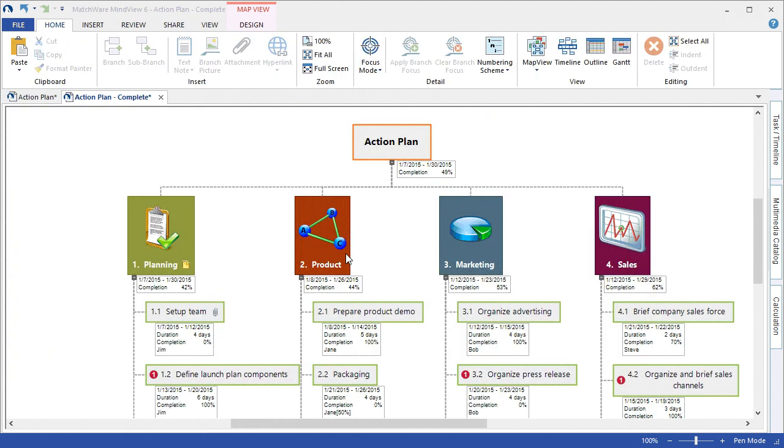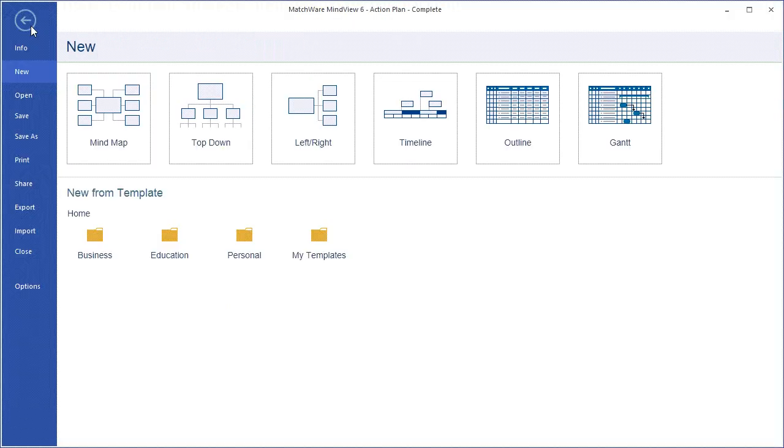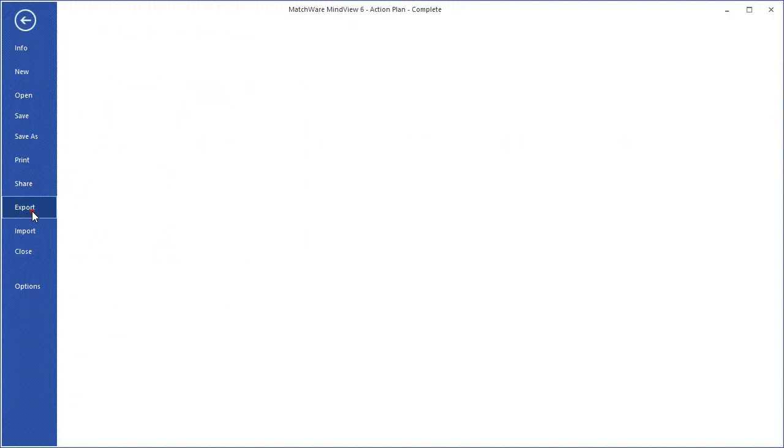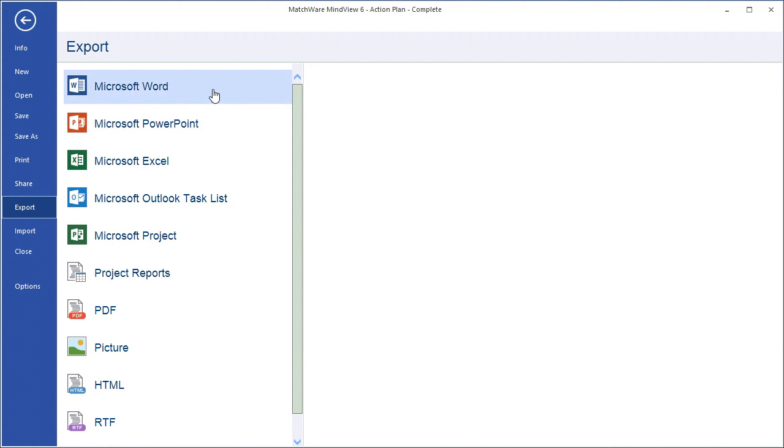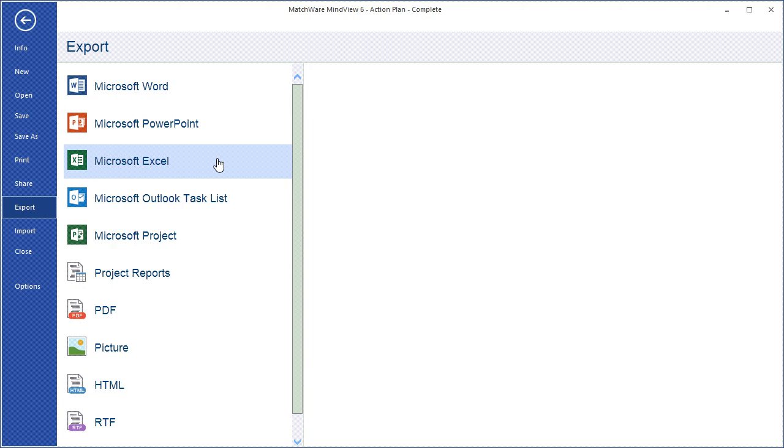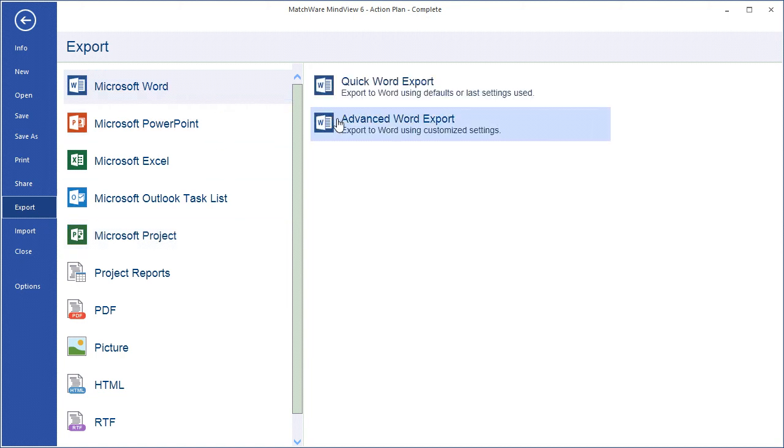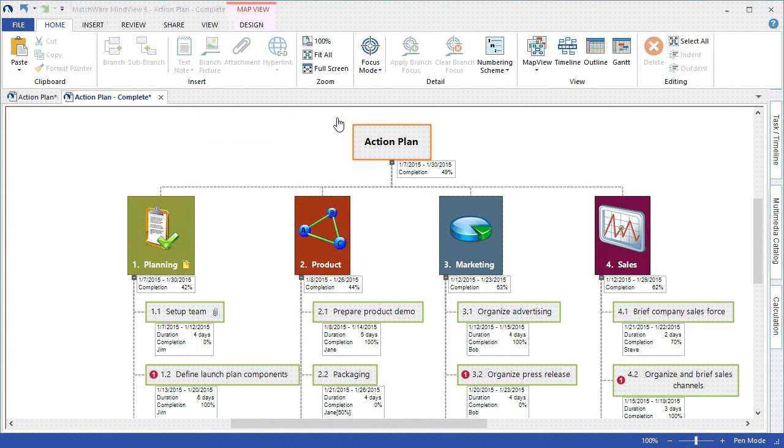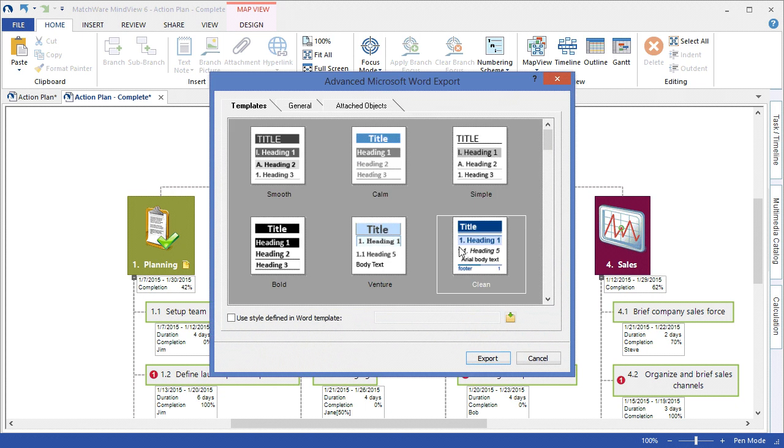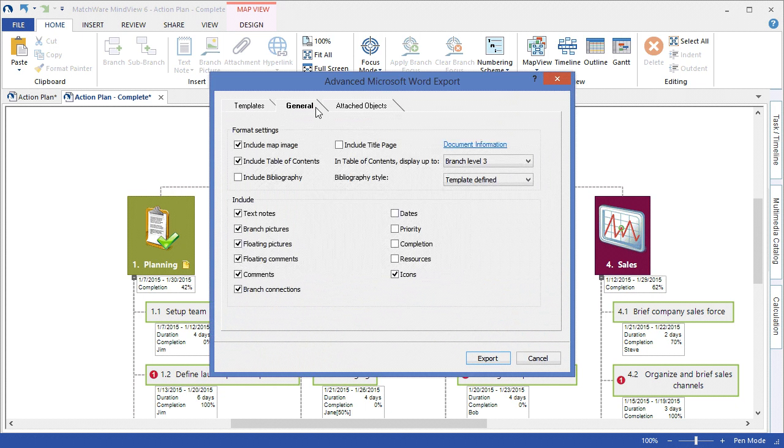MindView 6 also allows you to easily create project-ready information by utilizing the integration of the Microsoft Office Suite. I can export my MindView document out in several ways, such as a Word document to create a WBS dictionary or project scope, export to a Microsoft PowerPoint presentation to visualize the individual steps and stages of the plan, export the items out to Microsoft Excel, send each individual task to the corresponding resource using the Microsoft Outlook task export, and I can even convert the document to a Microsoft Project file. Let's go through some of the examples. We'll start with Microsoft Word. Choose the Advanced Word export, choose my desired type or template, determine the elements I want included in the project plan or action plan, and simply hit export.